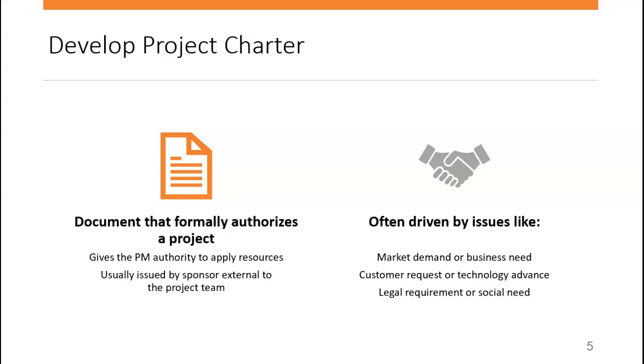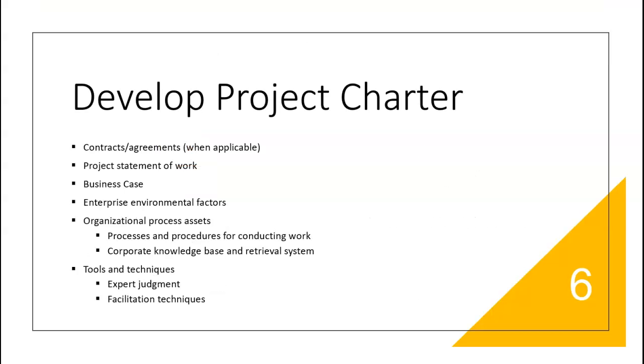And we need this project charter authorization and the sponsor to sign it because you may not have the official title of project manager without it, right? The charter formally authorizes your project and gives you access to resources, right? And in doing so, it also helps us understand the type organization we are working in to accomplish it.